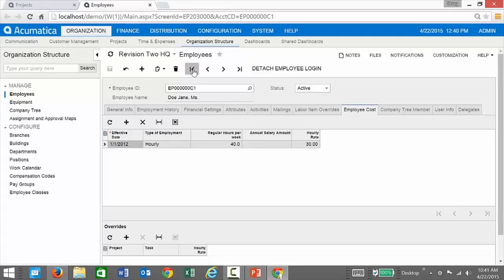Now, Acumatica also has the capability to handle salaried employees. So if Michael Andrews, the CEO, was doing some billing, notice that it automatically calculates an hourly rate based on his salary and a 40-hour work week. Now, Acumatica automatically, within Project, accounts for a hard-working employee. So if Michael Andrews bills 60 hours this week, it's going to reduce the hourly rate associated with that project. So that will mean that instead of being 72, it'll be 2/3 of that.